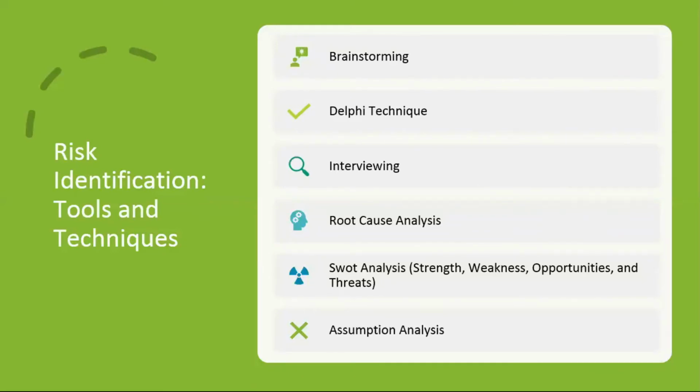Interviewing is when interviews are conducted with project participants, stakeholders, and experts to identify risks. Root cause analysis is a systematic process used to identify the fundamental risks that are embedded in a project. This usually occurs after a problem has developed and aims to find the causes.